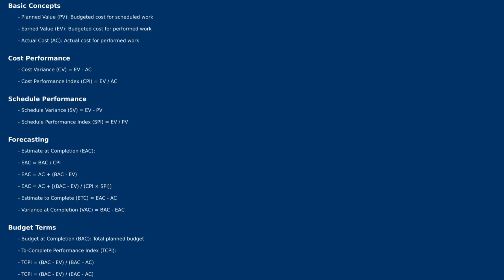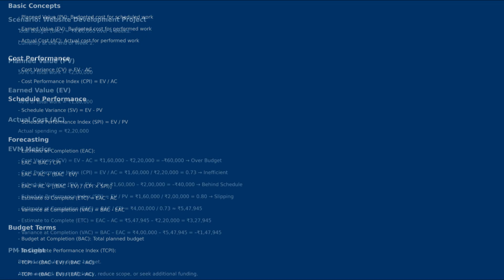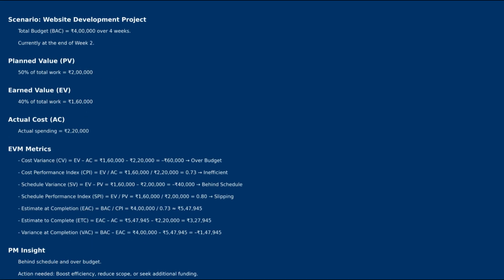We'll take up another scenario. If you look at the screen, we are talking about a website development project. BAC, which is the total budget, is $400,000. You have a project budget of $400,000 given to you, where you need to complete the project within 4 weeks. Currently, you are at the end of week 2, which means 50% of the total work should have been completed, which is the planned value.